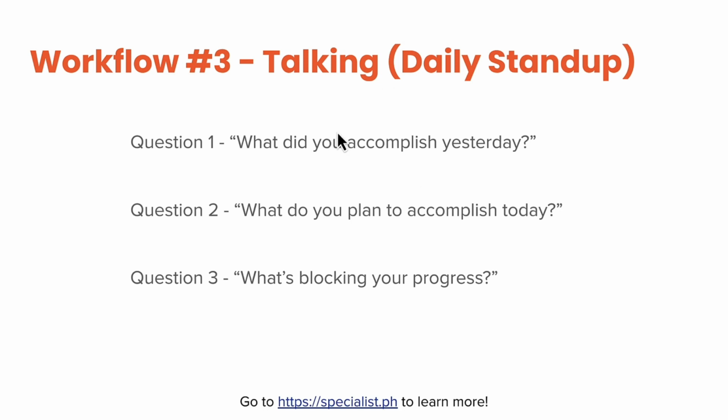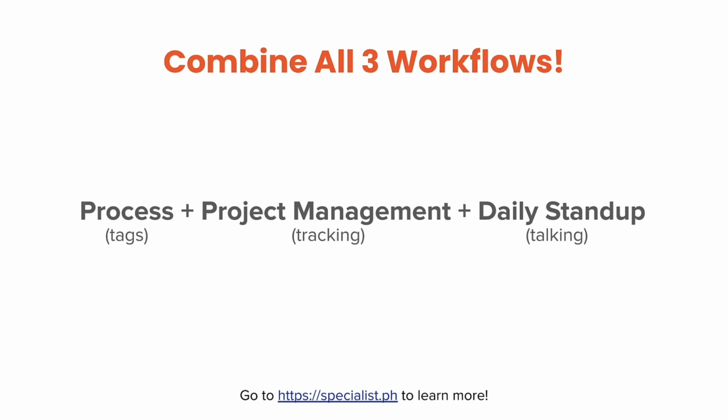So I ask 3 questions every stand-up call. Every single morning, we talk for about 10 to 15 minutes at most. And the idea is that this is a stand-up meeting, so it should be done and short to the point where you can stand for the entire meeting, if capable, of course. So we get a chance to review what happened yesterday, what's going to happen today, and we get a chance as a manager to understand and develop a plan for any roadblocks early in the day so that we can tackle those throughout the day. All right, so let's go take a look at how this works.